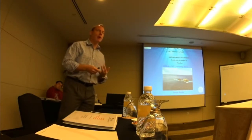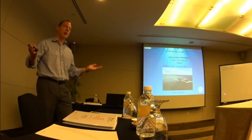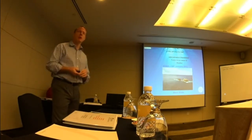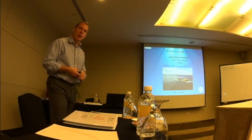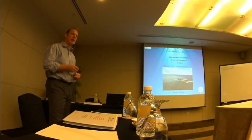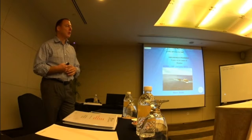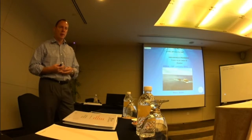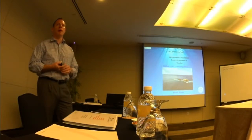that goes very quick. We've been involved in British Columbia on the removal of a tugboat. A 35 meter tugboat had gasoline on board, about a few hundred tons, I think maybe 150 tons. The tugboat doesn't carry that much. Of course, also in First Nations territory. So a very sensitive environment. And that total operation for a period of about 2 months was $35 million.